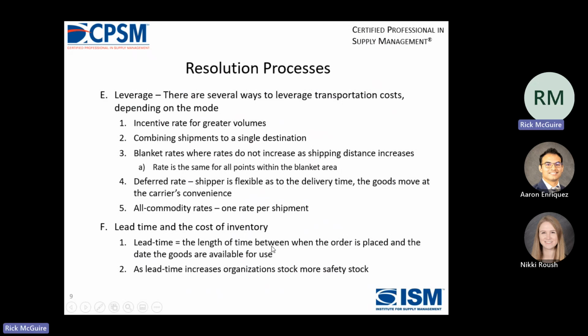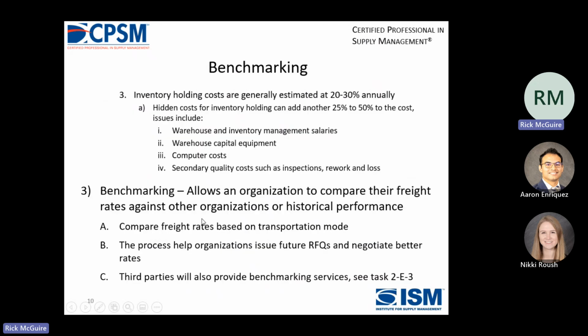Lead time is the length of time between when the order is placed by PACCAR and the date the goods are available for use on PACCAR's dock. So that's how our materials people will measure lead time also. As lead time increases, organizations stock more safety stock. Yeah, we really don't do that. We try to work with the supplier to get it here on time.